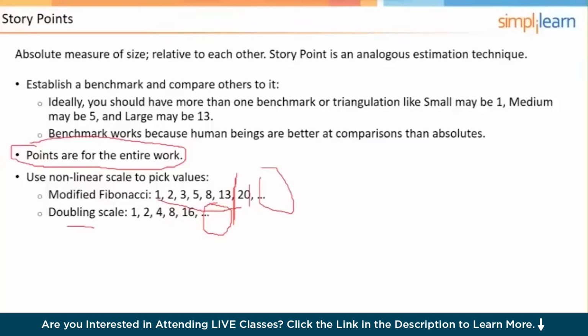So do we accommodate uncertainty when we're using story points? Yes, we're looking at the X factor, and if we've got an unstable user story, then we're probably going to say this is going to be a bigger user story than one that's similar but has a much lesser level of uncertainty. So that's the story points.